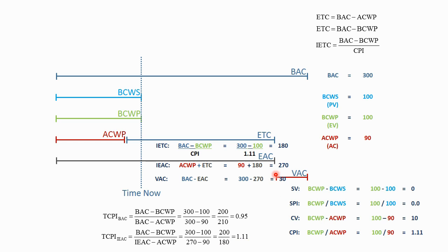So with this new revised estimate, what this says is the project needs to keep performing at this higher rate in order to close on this new budget. And if they keep performing at this higher rate, they will underrun by this variance of 30 hours. So one thing you'll notice is that on this new plan, we need to see a CPI in every future period that's reported of 1.11.